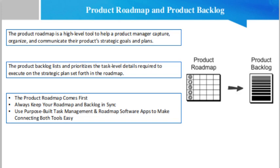Using the product backlog alongside the product roadmap: if the roadmap and backlog should be used together as complementary tools, how should a product team go about this? Here are a few suggestions. The product roadmap comes first. Before you can begin prioritizing specific product development tasks, you first need to have an overarching strategic vision for the product — your 'why.' You will almost certainly also need to receive the green light from your executive team and other stakeholders to move forward with your product's strategic plan before deploying budget, developers' time, and other company resources. For these reasons, you should develop your roadmap first and determine your product's high-level objectives, priorities, and plans.